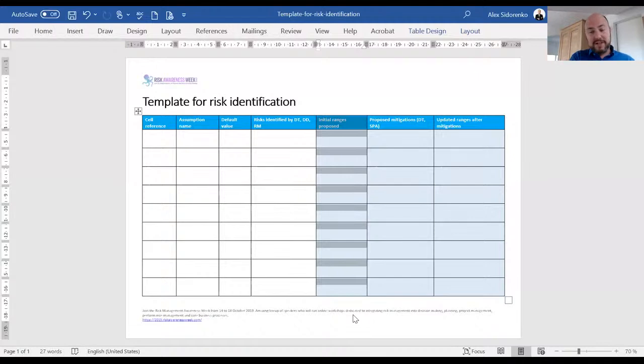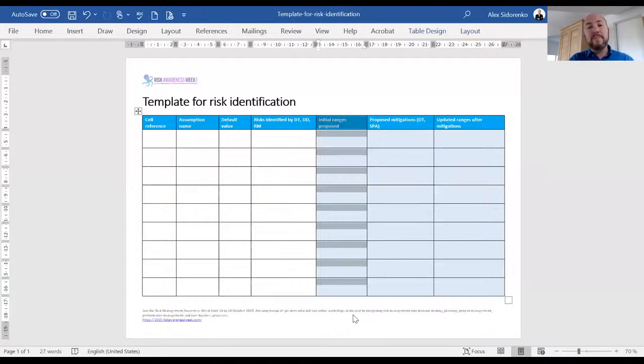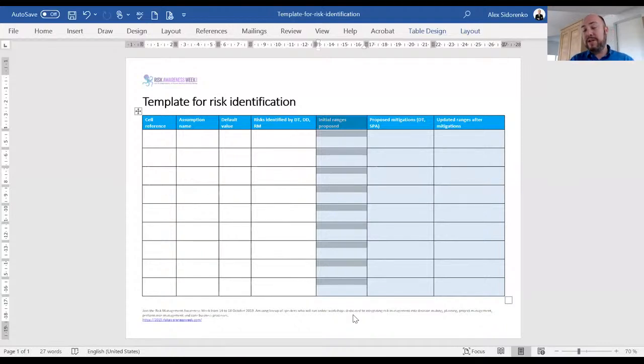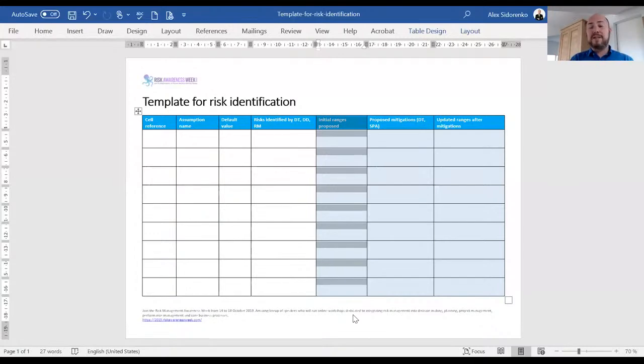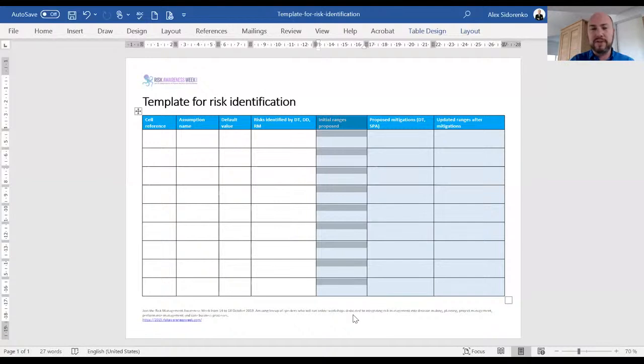We have them as a probability distribution. Now we can tell whether the decision is a good one, we can tell what's the likelihood of achieving or exceeding that decision. We can tell based on the tornado diagram what are some of the assumptions, hence risks, that have the biggest influence and hence need to be mitigated. It's already given us a lot of ammunition to improve the decision making. But that's not it.